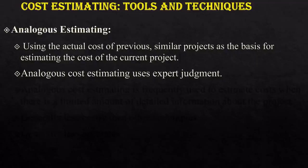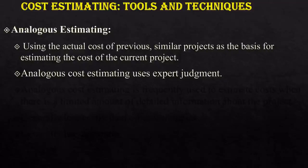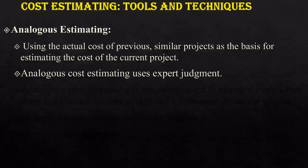Analogous cost estimating uses expert judgment. Even if you use costs estimated from previous jobs or previous projects or from your previous experience, day by day the unit rate varies — material cost is changing, labor cost is changing, etc. So you need expert judgment while doing analogous cost estimation.